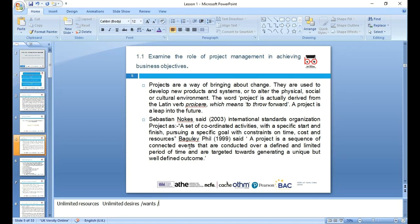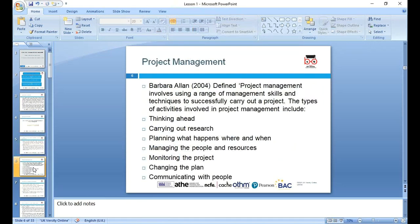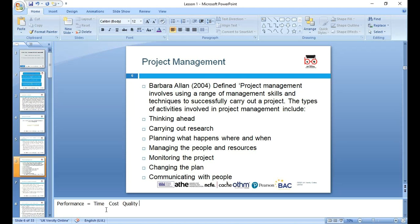A project is a sequence of connected events. If you want to build a house, first you need to buy land, get planning permission, then infrastructure with maps and plans, then you need a base — and some activities can be done in parallel. The target is generating unique and well-defined outcomes within a cost, within a time, and within a quality. Performance equals achieving things timely, staying within cost, and maintaining quality — it's not just cost reduction.